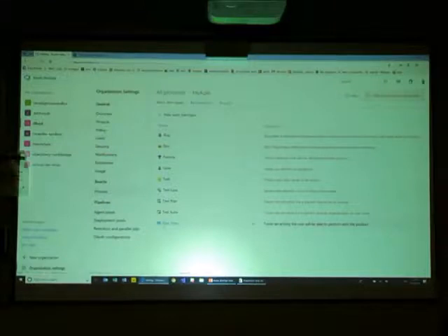Without getting too detailed, if you look, this is the agile template, and see it's got an epic and a feature. So an epic is like a project. A feature is a feature. It's a business level requirement. A user story is the team's requirement. It's a technical requirement. And then the task is an individual task assigned to a person.